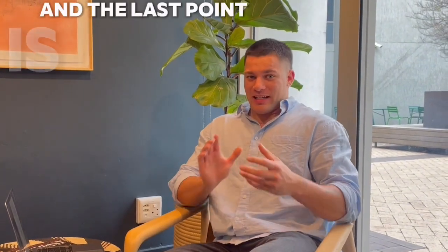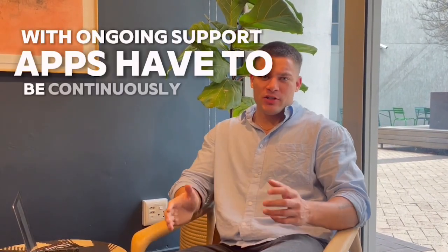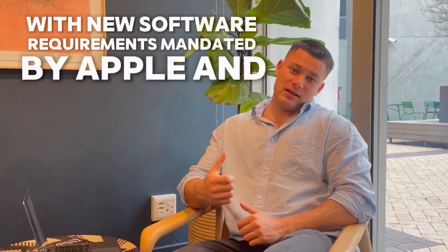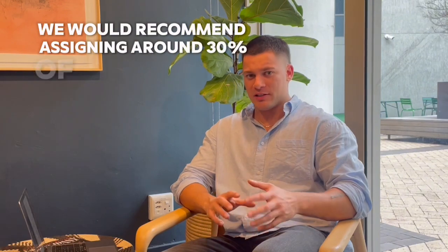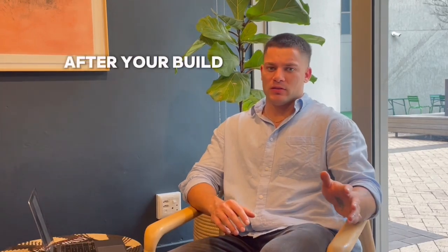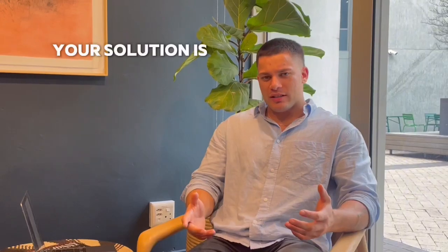And the last point is find a solution that's going to help you with ongoing support. Apps have to be continuously updated with new software requirements mandated by Apple and Google stores. You will also need to keep changing them to incorporate new features and functions which you'll need. We would recommend assigning around 30% of your build budget to support upgrades in each of the years 1 and 2 after your build, and then that might drop down to about 20% in years 3 and 4. Your solution needs to factor this in.